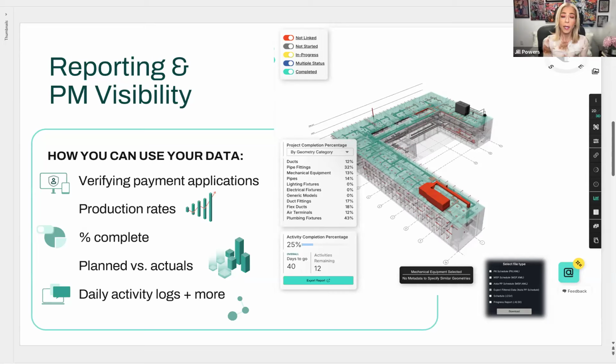And that lag, I imagine, caused a lot of issues, right? That's exactly right. They were planning downstream work based on incomplete pictures of what work had been accomplished to date. With our tool Progress, updates happen in real time. You're able to stream this information from the field directly to this model and linked schedule, which allows a customer, in this case, to capture incomplete installs earlier and avoid sending the next trade into areas that weren't actually ready. It was an important unlock for the way they were working in this phase of construction. This prevented rework and schedule disruption.